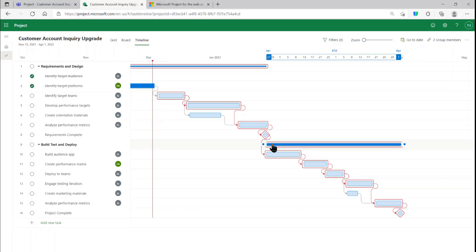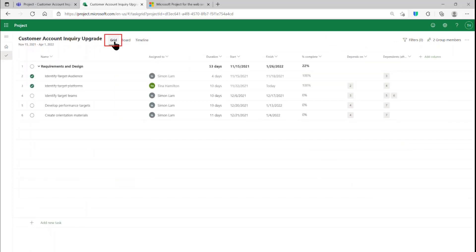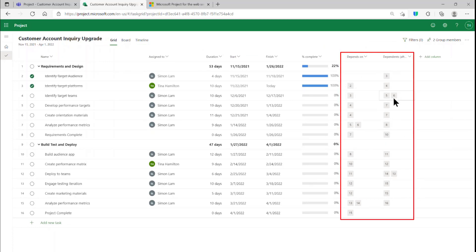This means, if you look at the grid view, that you've got valid values in all of your Depends On and your Dependents columns.